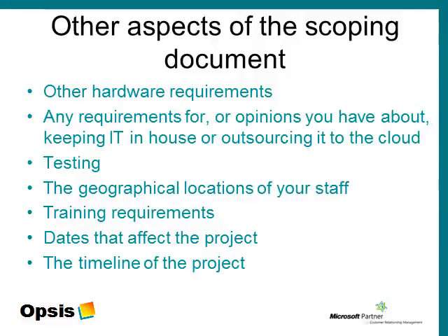Testing. A commonly made mistake is to test standard or out-of-the-box functionality, but not to test customizations, or to not use your data. It is also important to test both the mainstream and the exception processes. An example of this is to test not only that you can take credit card payments when everything works, but that all of the variations when the credit card doesn't work are also tested and all work as expected. Testing should not be misunderstood. Time has to be allowed to do this thoroughly. And when problems are found, retesting needs to be done after the problem is fixed.